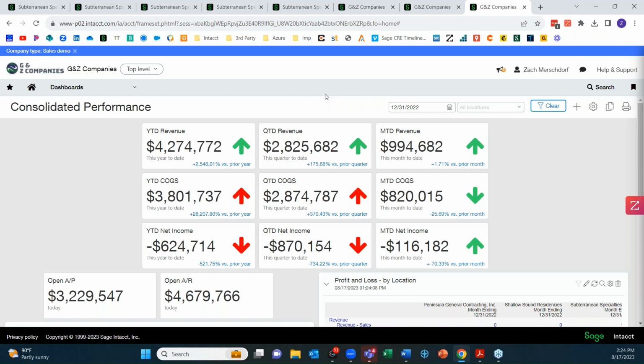So the one's a follow-up on that production rate question on dashboard. Tina's saying, what I mean was if the cost code is slab on grade and the task is 5,000 square feet, the budgeted hours to complete slab on grade is 1,600 hours. So our estimated production rate is 3.125 square feet per hour. As the project is in progress, can the actual versus budget production rate be viewed?